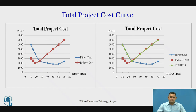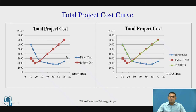This is the total project cost graph. When we add both the direct cost and the indirect cost curves and represent both on a single graph, we get such a graph. The blue curve is the direct cost, and the brown color is the indirect cost. The green color curve represents the total project cost, which equals direct cost plus indirect cost. The intersection point of the direct and indirect cost curves gives us the optimum cost as well as the optimum duration of the project.